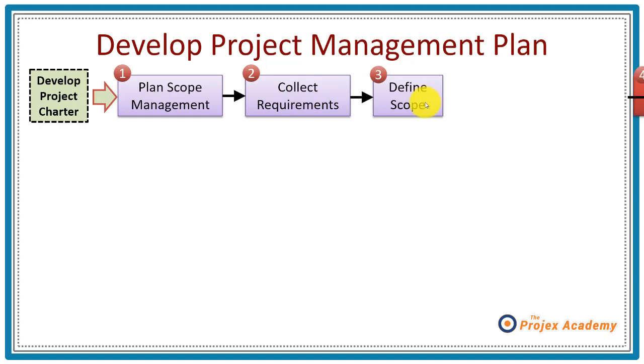Bringing us to step number 4, which is creating the work breakdown structure. This is significant, as you can see by the colour I've used here. And it's here in step 4 that you create what is known as the scope baseline, which happens to include the work breakdown structure. And you could argue this is one of the most important components of the project plan, where you would break down the project deliverables into progressively smaller components. I'm sure you're familiar with what it looks like.